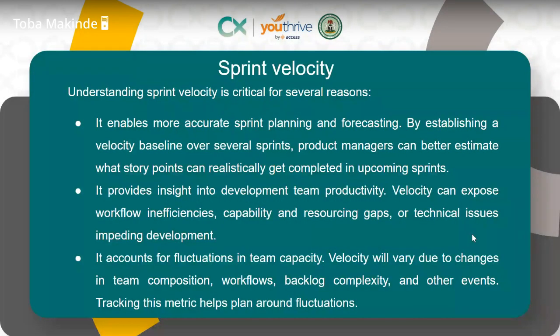It's something I mostly do when it's a very large user story that requires a lot to be done. We can have 2 phases, where one phase goes into the first sprint and the other goes into another sprint. So instead of just giving 5 user story points, you can give maybe 3 for each of them and ensure that you define your definition of done.